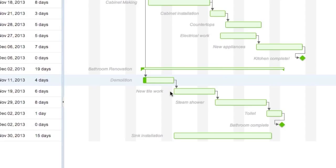There, now I've communicated to the team that new tile work can't be started until demolition is complete.